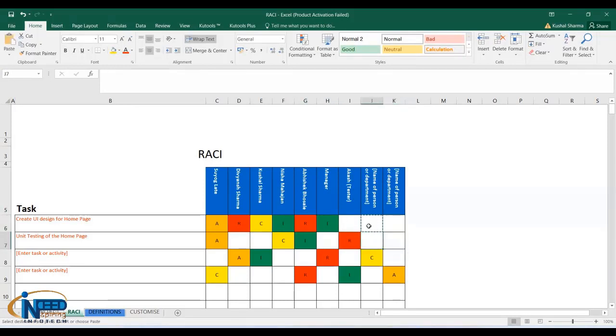Now next point is who is accountable? Responsible is Akash. Who is accountable? Because Suyog is managing the whole project, Suyog will be accountable. So let Suyog only be the accountable. Who will be consulted? Like whom to ask? Again, I can be consulted because I'm SME and I know that area and domain. Yes, and then informed.